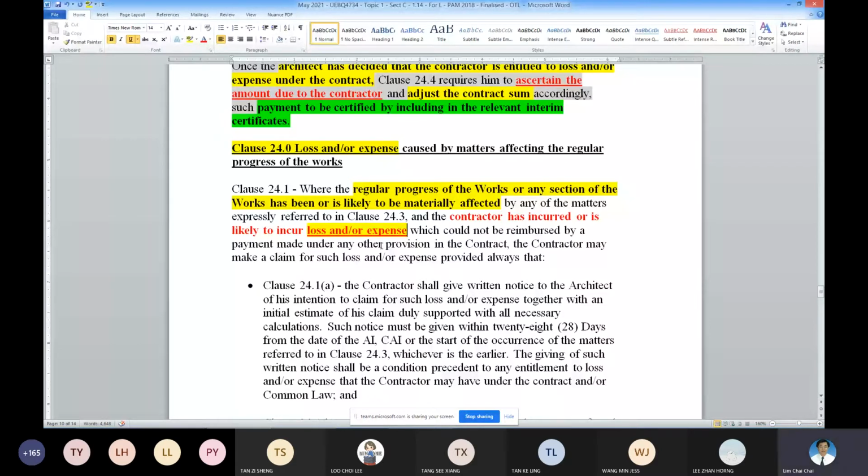Scenario number 2, if the contractor doesn't agree with the 20 days evaluation, the contractor can go for arbitration. And the arbitrator says, okay, after looking at all the details, the fair one is 40 days. So that 40 days is going to be final unless the employer or the contractor wants to challenge it further, and this time it will go to the court already.